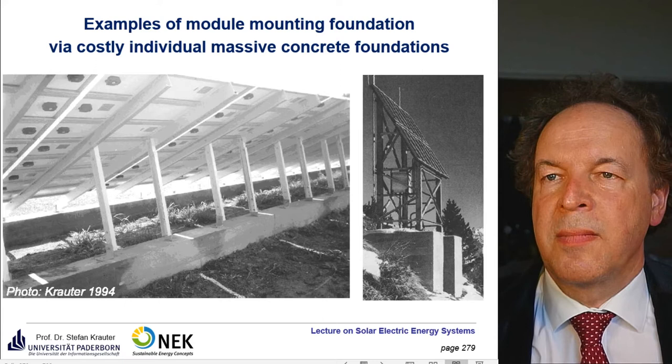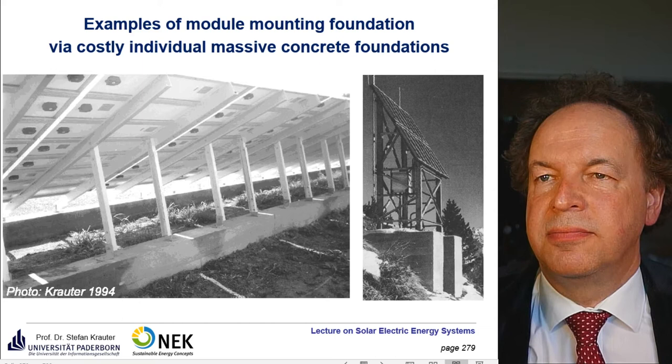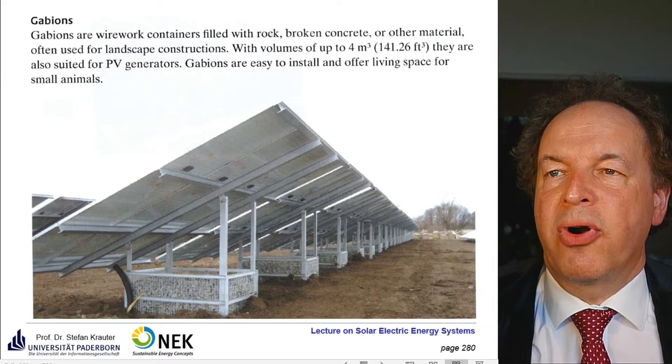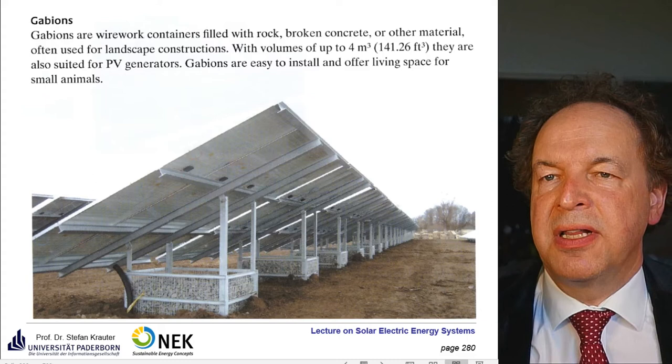This is how it was formerly made, with concrete blocks made on site. This took a lot of time and was terribly expensive. A little bit more efficient are so-called gabions. So these are containers which are filled with rock, broken concrete or other material. And so you don't have to wait until the concrete dries. You can immediately do the installation after you have filled up these gabion foundations.